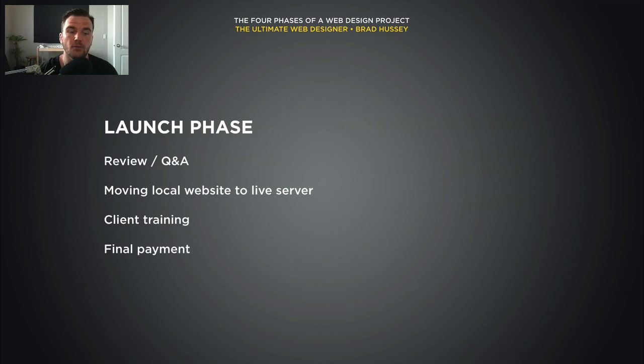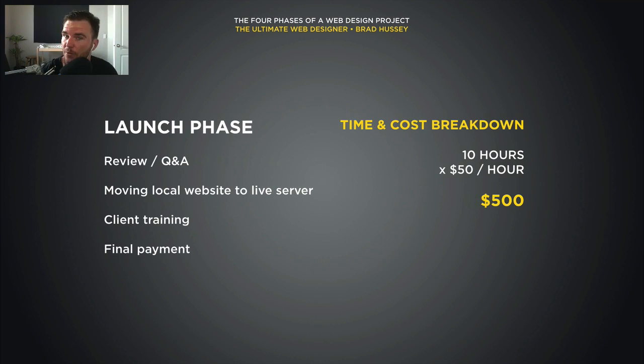And then at the end, I will take final payment, which is 50%. I say I will take final payment upon completion of the final deliverable, like launching the website and training the client. Time and cost breakdown, about 10 hours, $50 an hour, about $500. This could be a lot larger if you have a big website and you need more training time. This could be 20 hours, could be 30 hours, but I find 10 hours is a pretty good number.